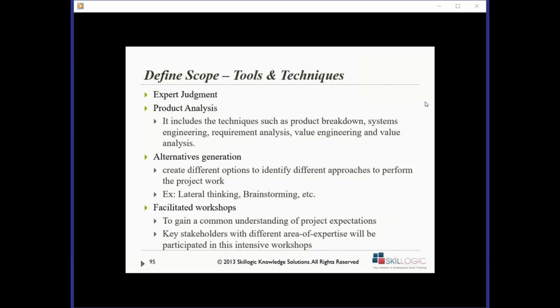Okay, so that was about the WBS, work breakdown structure. That is dividing the work. Initially, when we have the work, whatever we have to develop, it is at a very high level where we would not be able to understand what work has to be done to accomplish this overall product or service. Breaking it down into manageable packages, I would not say task, because task is a further breakdown, to a work package level is called the work breakdown structure.